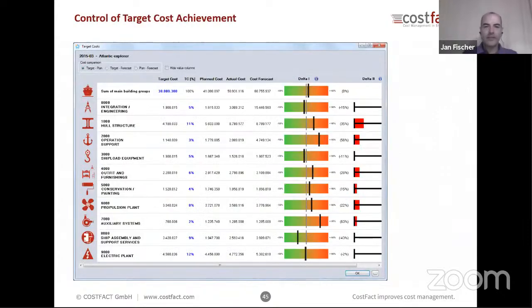So then finally, the last chart, that is about target costing, one of my favorite approaches in costing, so that we define absolutely in the beginning, before we start our cost estimates, to set a cost target, to have the idea, well, what do we like to allow the project to have as a cost? What do we believe is the cost that we have to achieve to get this project? Of course, we have to fulfill all the requirements from the specification, no question. But we have probably a couple of competitors, and we want to have this project. And if we fulfill the specification requirements, we will get it if we are the one with the lowest cost. And what do we believe? What is the cost we do have to achieve to get this project?